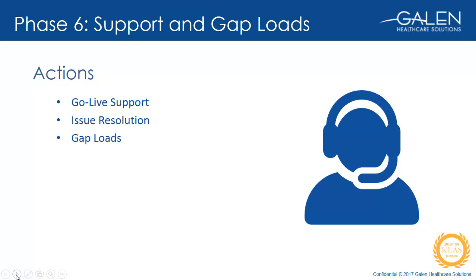And then issue resolution. So post migration, even though testing has been very thorough and so on, from time to time we do encounter issues that crop up that need to be resolved. So further discussion about each issue and whether or not to fix it, to be included within the scope of the project or as a separate addendum, then takes place. It's very common for issue resolution to take place over a week or two after the migration.